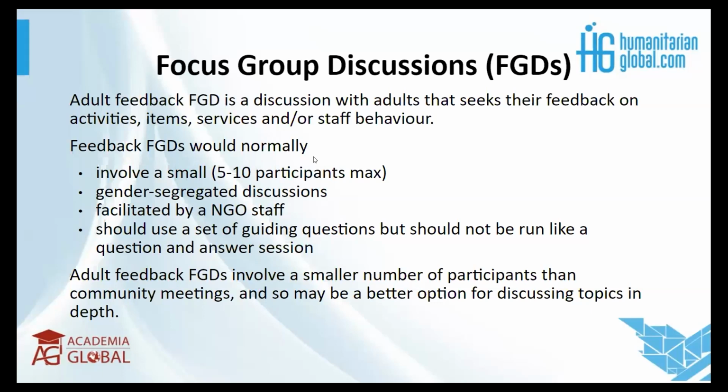And then secondly, it's gender segregated. So you should have male focus group discussions, which is also facilitated by a man, and then separately a female focus group discussion, which is facilitated by a woman, because mainly in these vulnerable and marginalized communities, there are issues that are more faced by women, and they feel that maybe they may not open up completely when the males are there, because remember, in the society, that's how they live, but they may not feel that they can give that feedback if they're put in together.